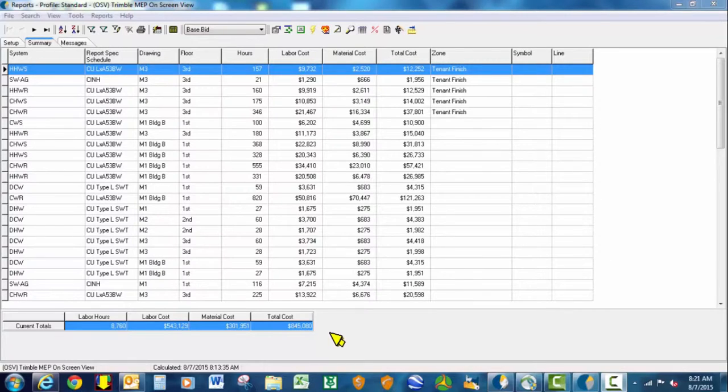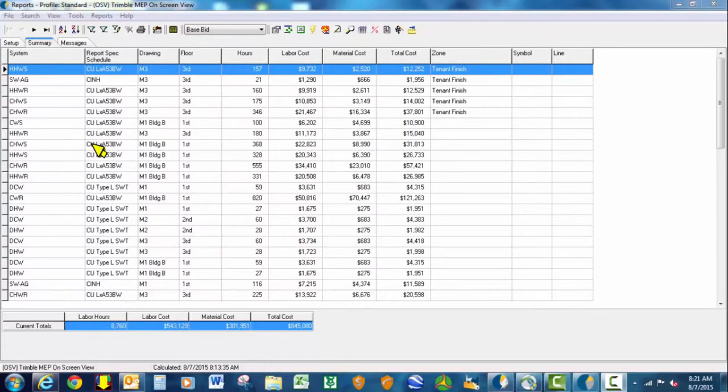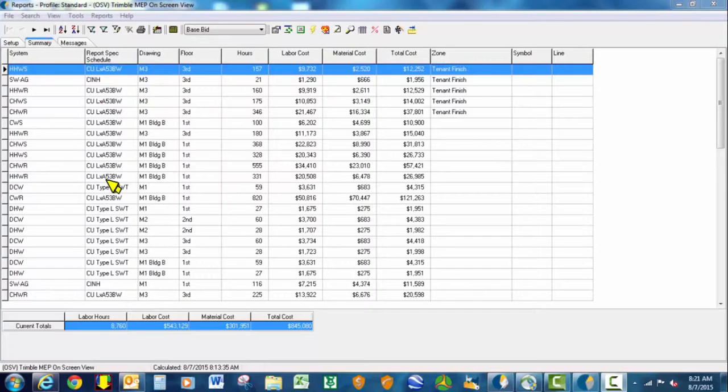We want to do a cost comparison between, in our heating water and chilled water, we want to change it from a copper butt weld spec to a copper by groove spec, and see what the difference is in the material cost and labor cost.